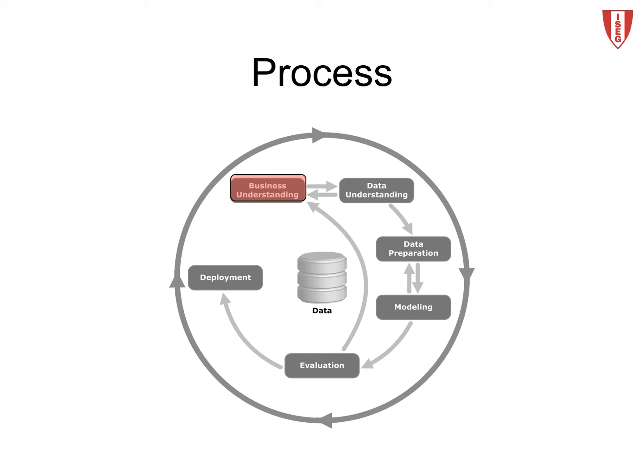Business understanding consists of business objectives identification, context description, including risks and contingencies, identification of data mining objectives, and producing a project plan.